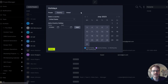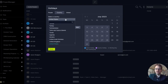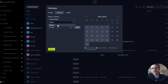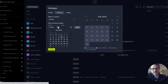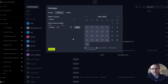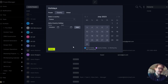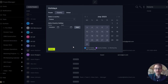If you have an international team you can set holidays by country. So if you're in France you probably don't want to work on Bastille Day — find France in the filter, choose the calendar icon, pick Bastille Day, and add it to the calendar. Now that day will be blocked off from that team member's availability so you won't accidentally assign them work on Bastille Day.